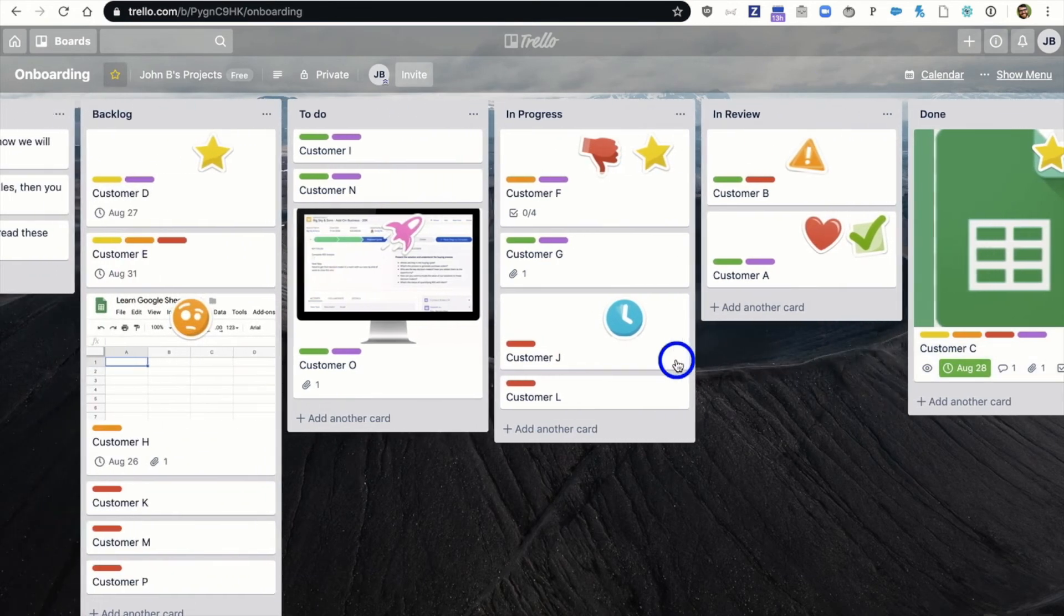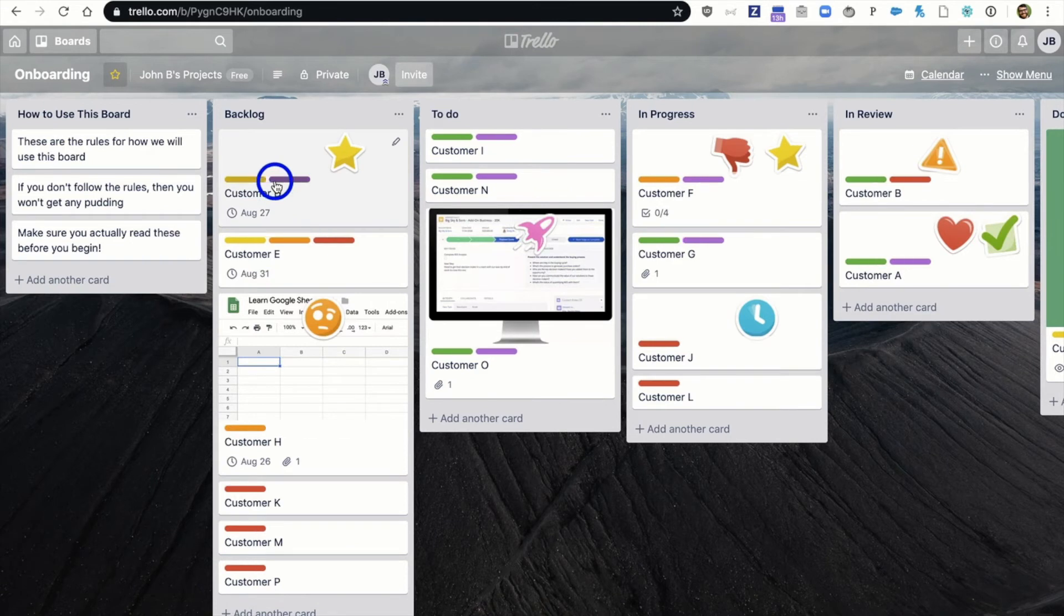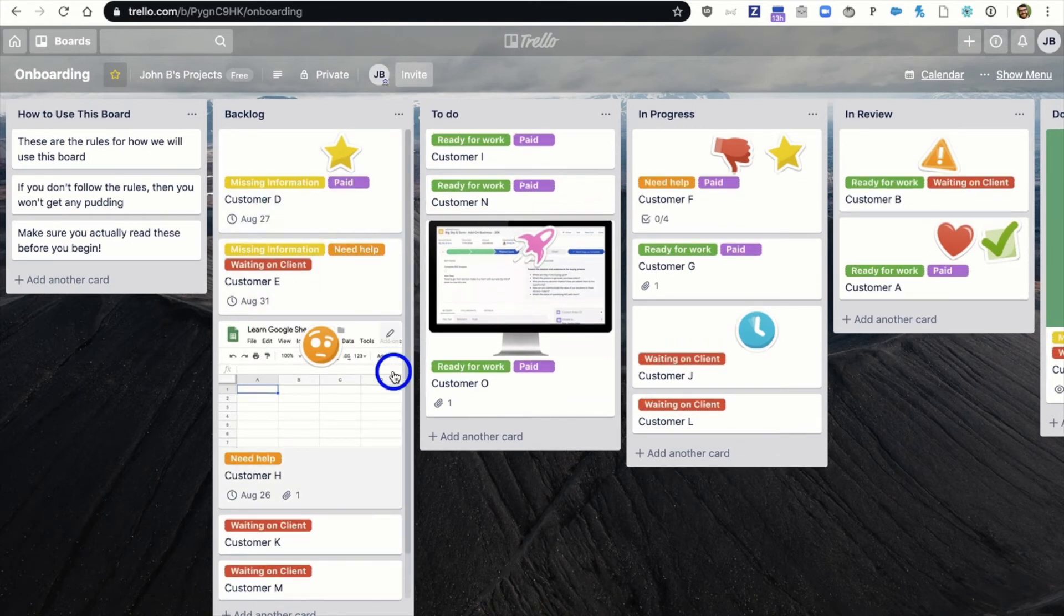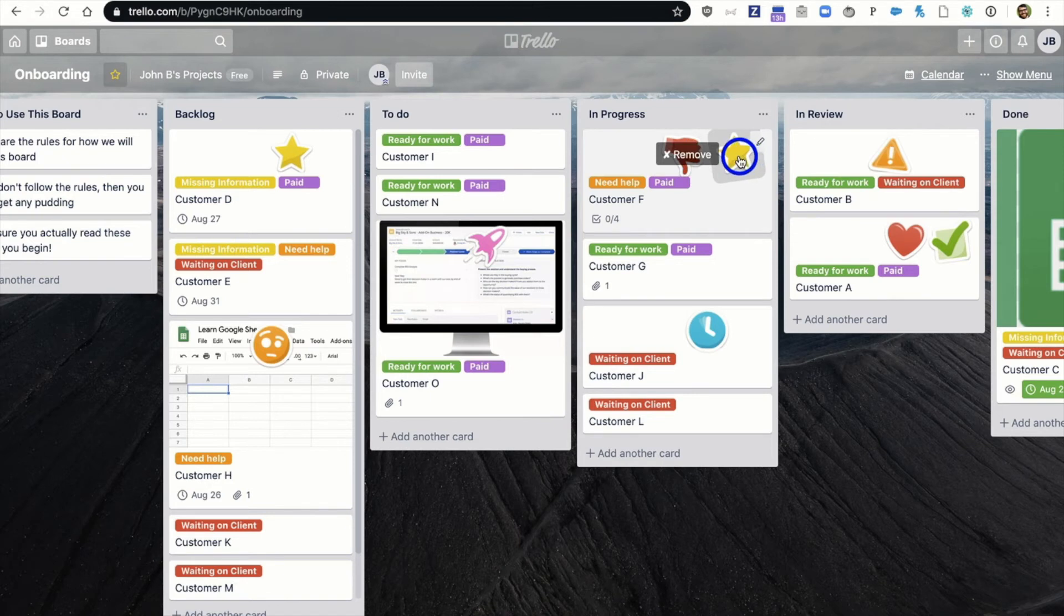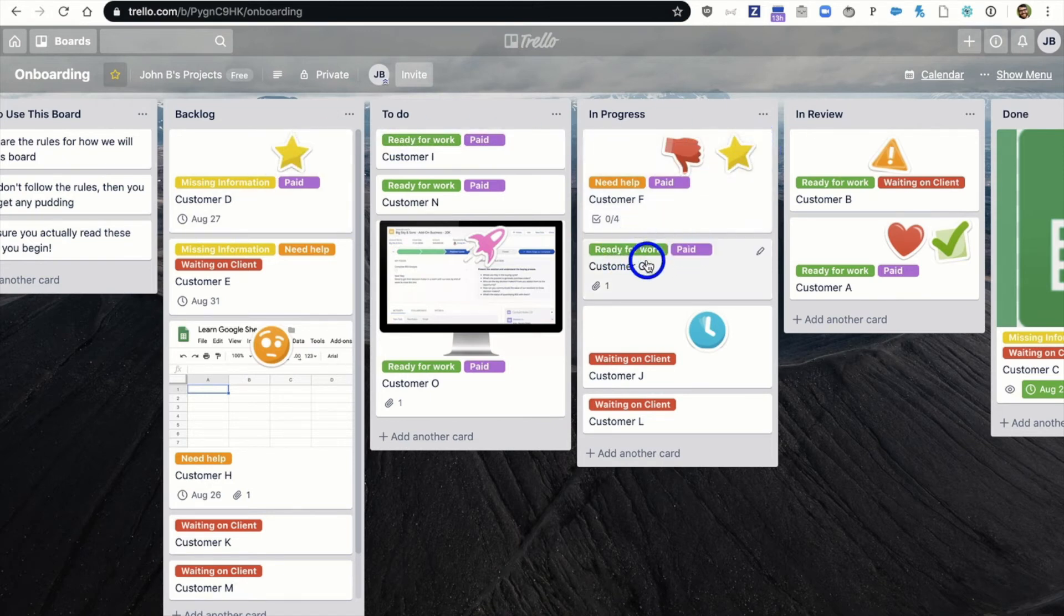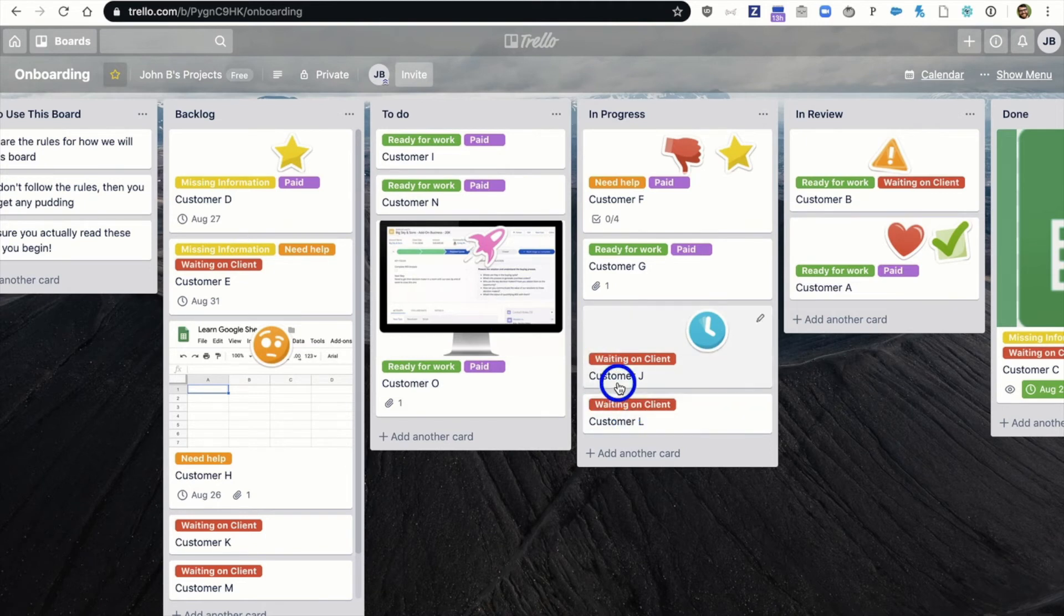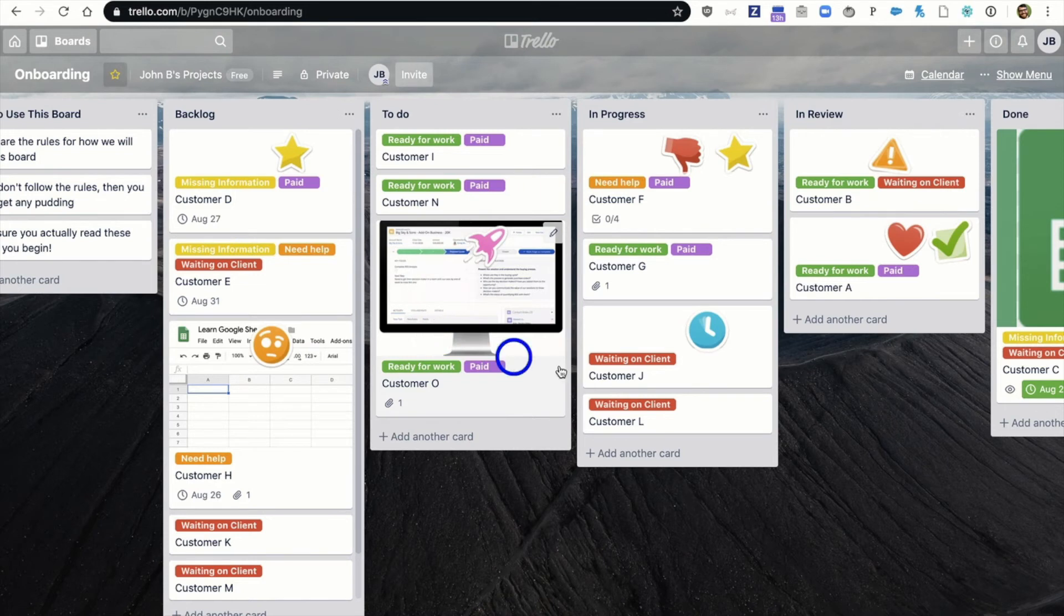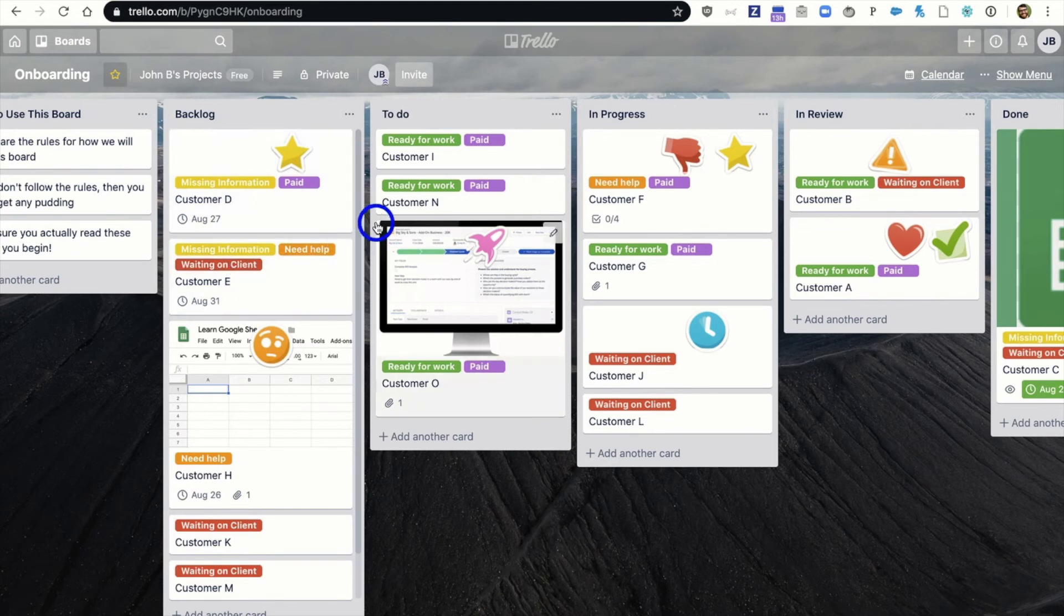Each one of these cards too. I love showing this because you can just click the little labels. Then you can see at a glance exactly what needs done and where. So these stickers can mean something different inside your organization. For us the stars mean important customers that we need to work on. The labels are essentially statuses that we need to keep track of. We only work on paid things here. So we want to make sure that we're only working on paid things. We have a little stoplight system that we use as well. For example, red means stop altogether. We can't work on this because we're waiting on a client. Yellow means we're missing information. So we need to get that information. Need help obviously need help getting that information. And then green means ready for work.